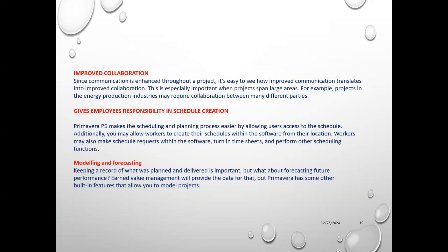Modeling and forecast. So this is what we could talk about. You can do the look ahead, and using Primavera, if you have an additional tool called Monte Carlo, you can do the modeling and simulation to see how the project's delay is accumulating. So if the delay continues like this, when am I going to complete? You can do a forecast. So you can import the Primavera schedule into this one, and that will help you to do the Monte Carlo simulation. That will tell you when the project can be completed and with what cost. Or in a simple way, using Primavera itself, you can do the modeling, doing a what-if scenario.